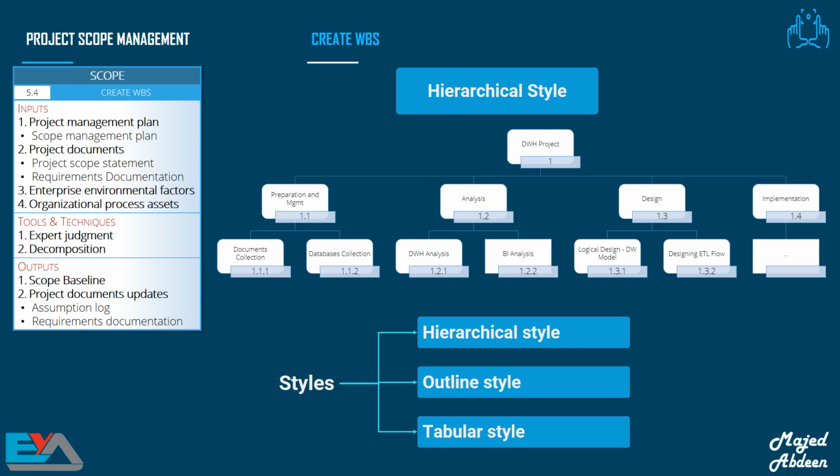Now, you can see that we've converted the list we had before into a hierarchical form, which is like a T-view subdivision of the hardware, services, or data required to produce the end product. In this format, the WBS looks like an organizational chart. The WBS chart displays the information in a hierarchical way, making it easy to have a complete overview of the deliverables, and it also lets us see how one deliverable relates to another. It also helps everybody to see the magnitude of the work that needs to be done.